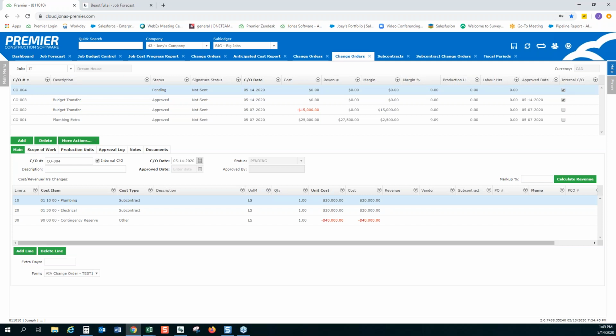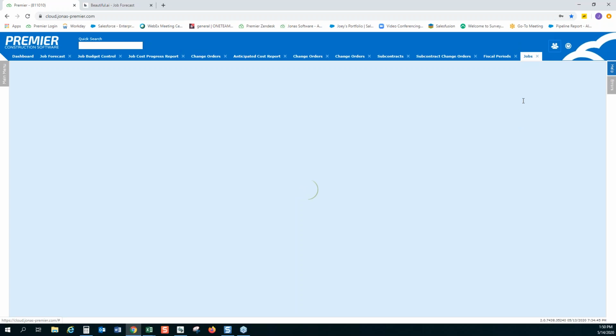Awesome. Can you lock job forecast by job instead of for the whole company? Oh, so that was kind of that last point we talked about, why it's beneficial to do it for the company as a whole versus on a job-by-job basis. Again, it's to make sure things are streamlined and automated so that you don't have to go job by job, or you shouldn't be locking it for certain jobs. And it's a risk factor. By having the ability to lock it at the end, typically how it works is, as I mentioned, you get that final okay once everyone's got their costs and forecasts in. Then you lock the period at the end and it locks it for all jobs. There is a lock for the individual jobs located on the job screen. You can utilize that, and if I remember correctly, it should stop you from even entering an anticipated cost.